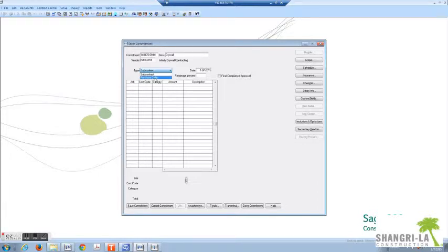materials would be a purchase order because they don't really need to have a 15-page subcontract. And we are typically subject to their terms, not ours. And there are a few other occasions where purchase orders are appropriate. But again, a vast majority of the time are subcontracts.